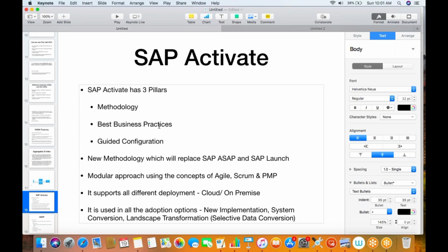So out of 100% of the functionalities, if 60% are fit, only 40% are gap. So these fit things can be implemented in less than 1 month itself. Why wait for 12 months? Those functionalities which are already fit, we can ask the customer, okay, we will simultaneously work on the 40% gaps, but at least whatever are fit, you can start using it in the next month itself. That is called a modular approach. We don't want to wait till all the 100% of the functionalities are developed. We can ask the customer, whatever is already fit, at least start using it. Okay, at least you will start running the SAP system.